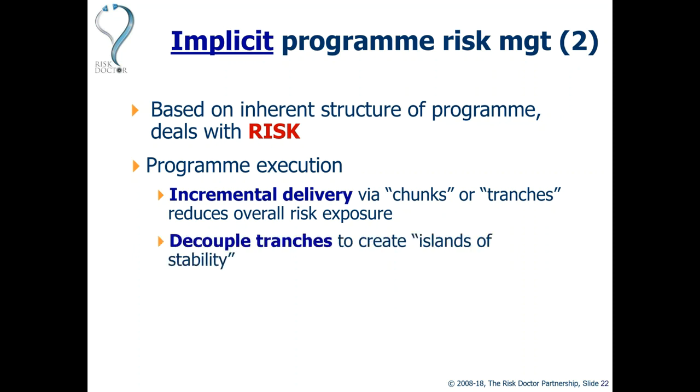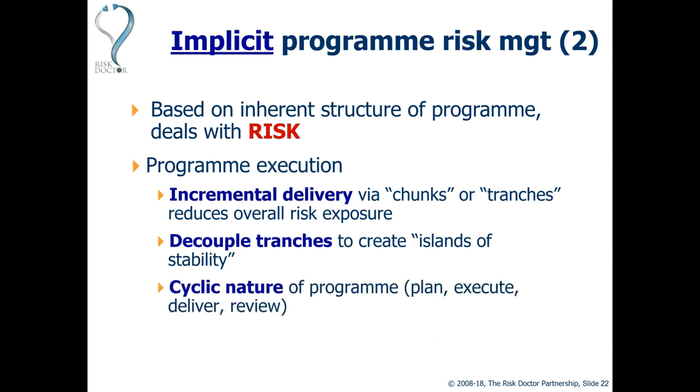And we can decouple the tranches or the chunks to create what we might call islands of stability. That phrase has been used in MSP previously, in order to say, well, here is a kind of safe area where we can isolate or insulate a part of the program and deliver that value without it being affected by other risks, and that will help us to create value and manage our overall risk exposure.